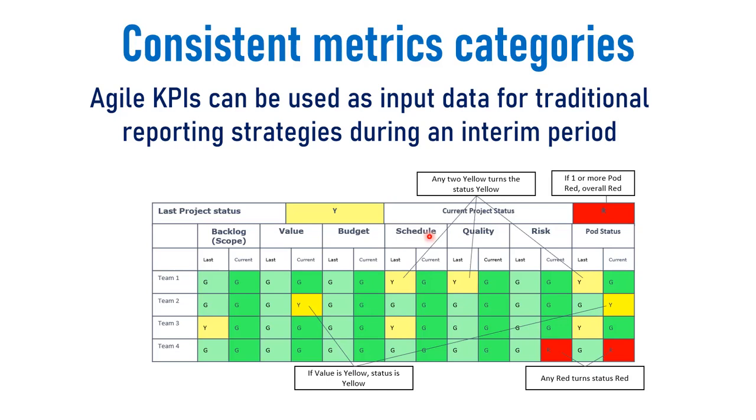It's not true that there's no release map or no overarching idea of where you're going in Agile. There should be, and even risk. You can actually populate red, amber, green dashboards like this. The underlying triggers for the colors will be context specific according to the project, according to the team, right?